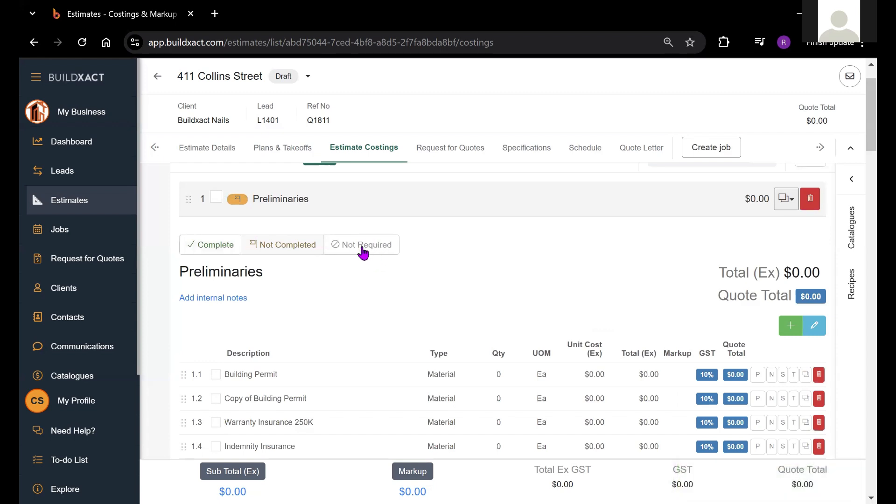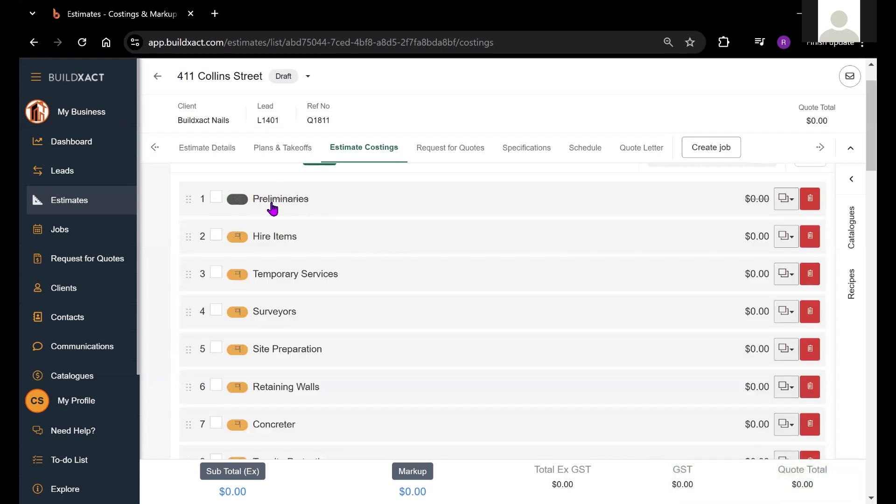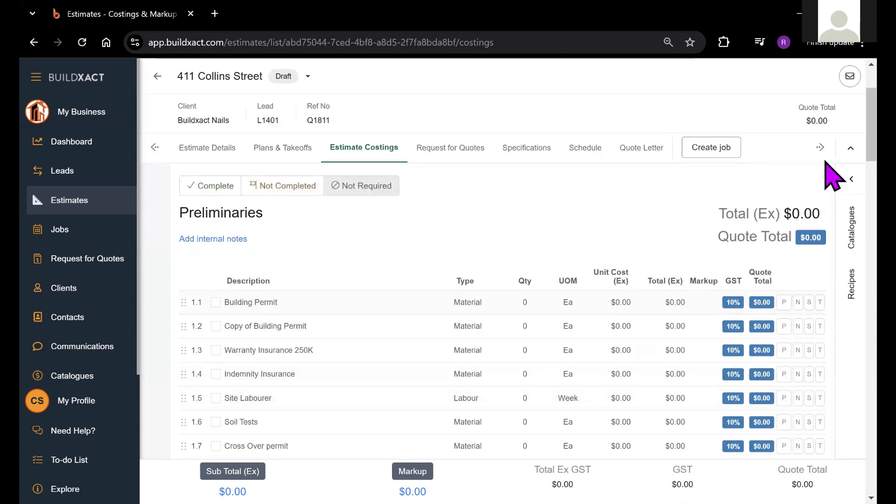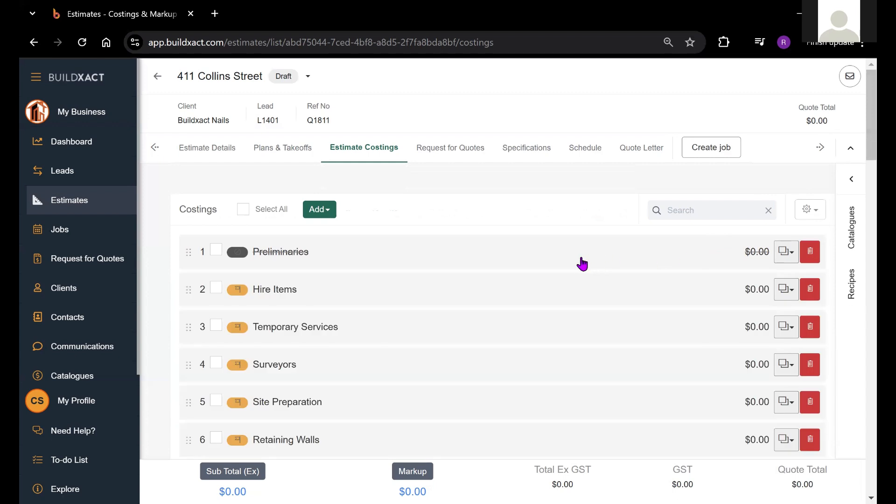This can be quite useful for a variety of applications. If I mark a category as not required, we'll see that it's struck out. Essentially, that means it's not going to be included in the quoting process moving forward. If there were items priced up within this category, all of those items and the prices attached to them will not be included in the quote total.